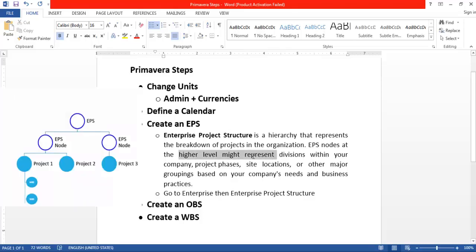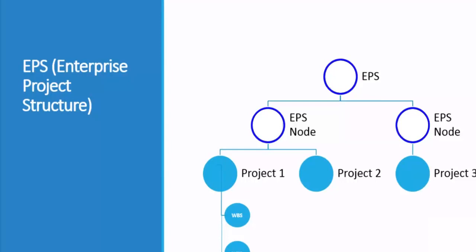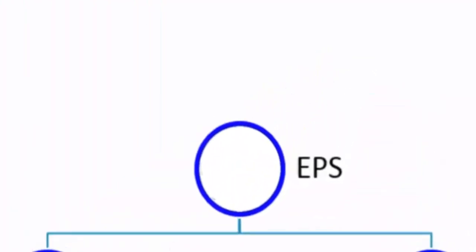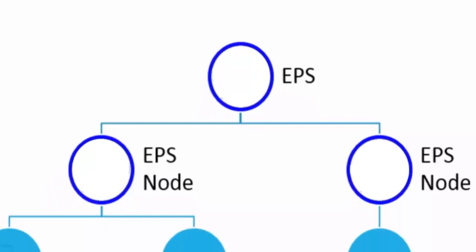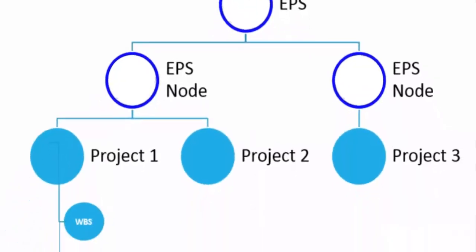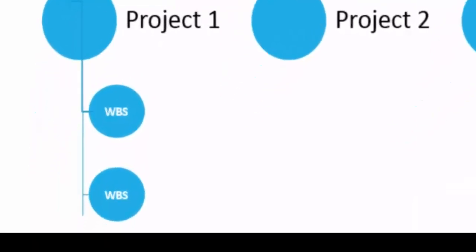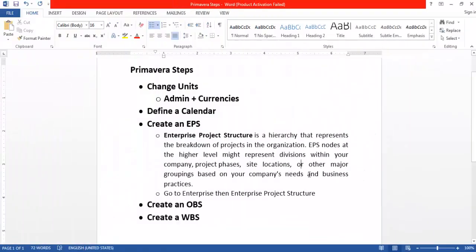EPS nodes at the higher levels might represent divisions within your company — for example, your company at the top level and its divisions at lower levels. Or it may represent project phases, where the total project is at the top and the different phases are at lower levels. Similarly, it can represent site locations or other major groupings based on company needs and business practices.